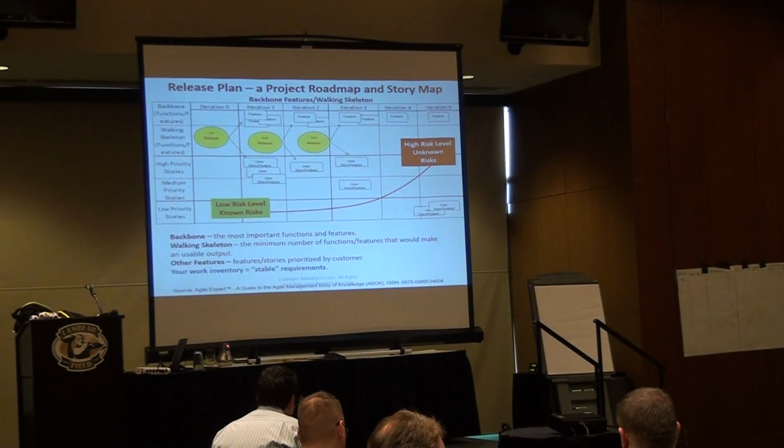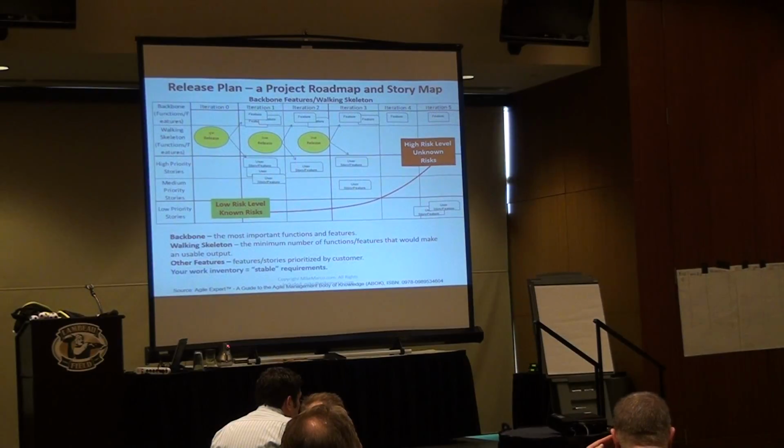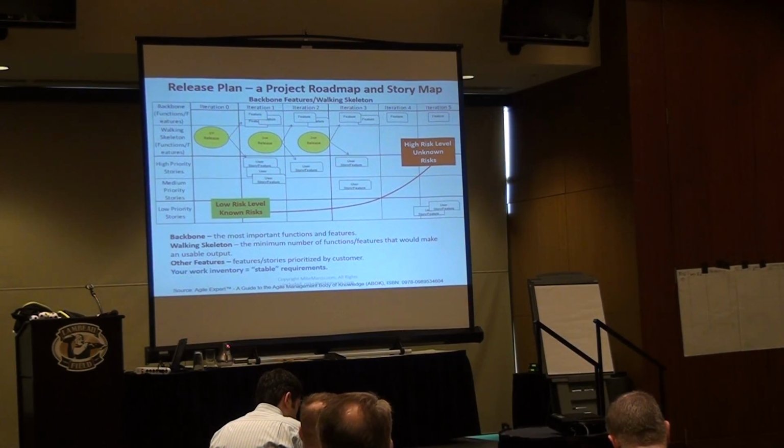So in Agile, where is the risk? The risk is toward the next iteration of sprint, because I only plan for 2-3 sprints ahead. Why? Because we don't have a complete requirement. Things are changing, etc. So my risk is pushed toward the next step, next level of my effort. Why don't I have a risk right now within my iteration? Because based on Agile framework or concept, you're supposed to have stable requirements and expertise in your hand to deliver. So when I'm doing work in Agile environment, that's a minimum amount of risk that I have. The risk is coming later.